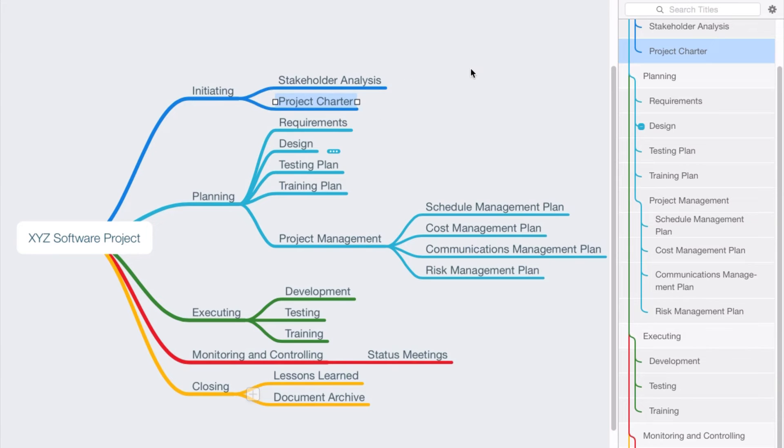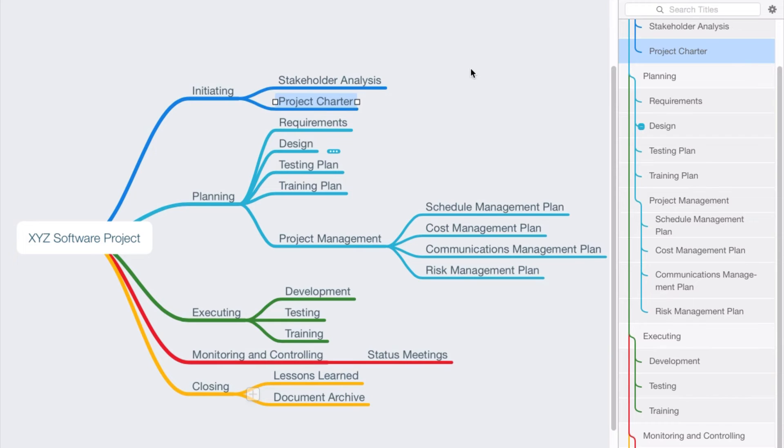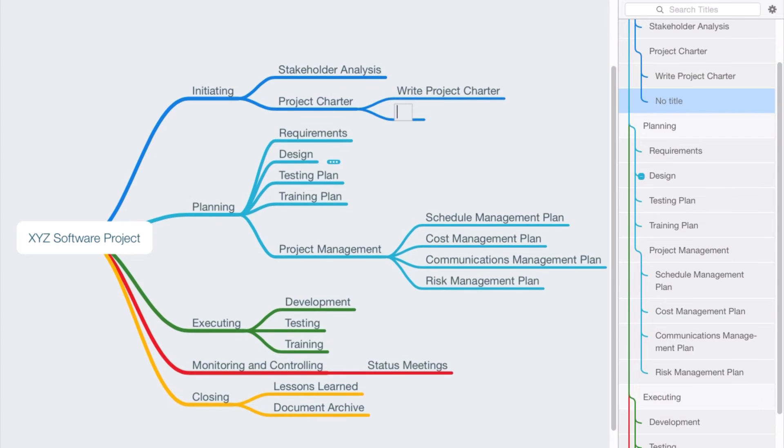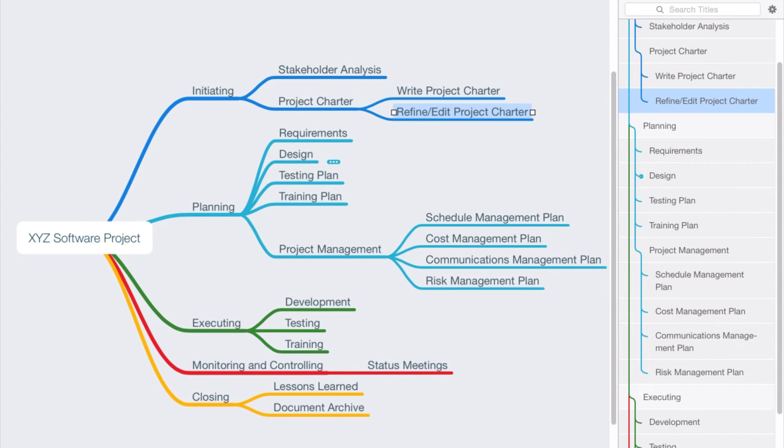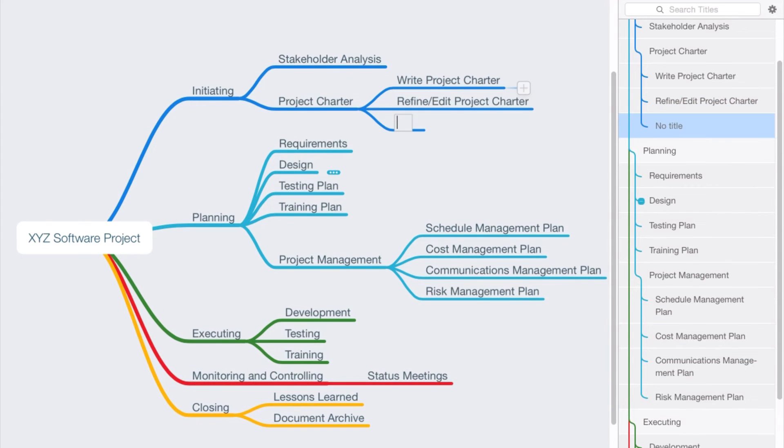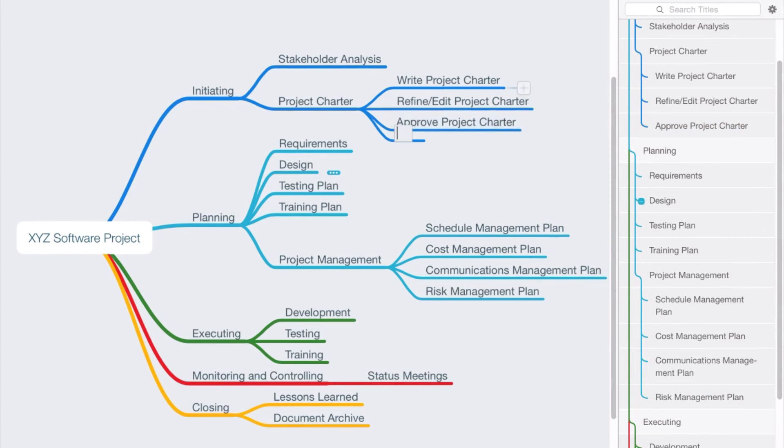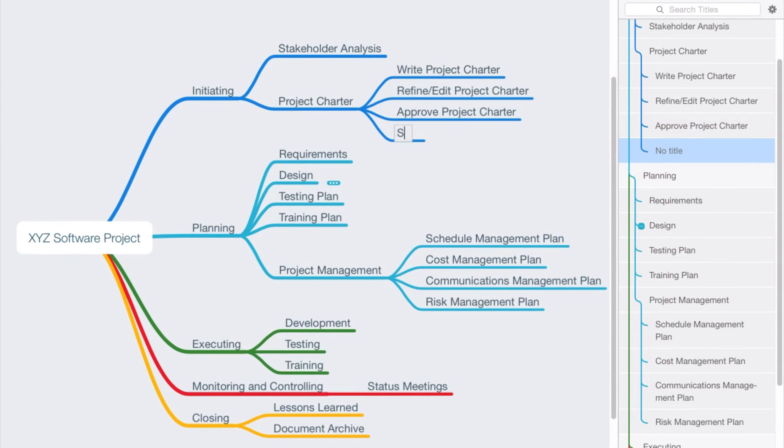And I'll just start with this item, project charter. If we wanted to break this down further, we might have some sub-components here where we say write project charter, and we may say refine or edit the project charter, we may say approve or baseline the project charter.